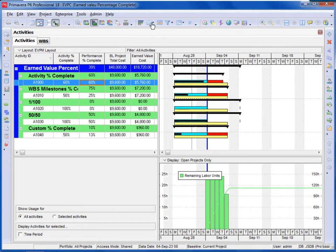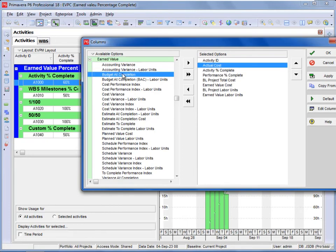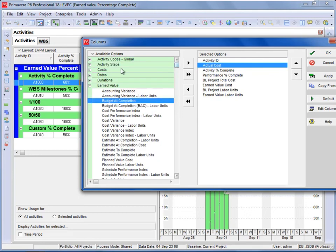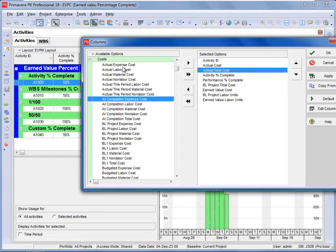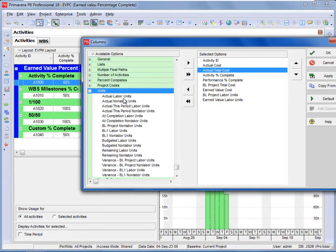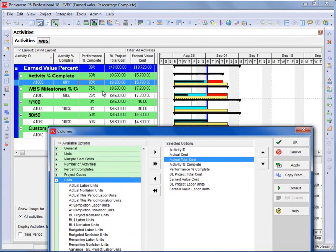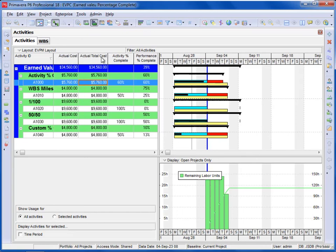If you go to the columns in the activities window and select Earned Value, you can see actual costs there. These actual costs from the Earned Value columns will be exactly the same as the actual total costs from other columns. You can see actual expense, labor, material, or non-labor costs. Going to the units, you can see only actual labor and non-labor — it will not display actual expense quantities or material cost quantities. When you select OK, the actual costs from both the Earned Value fields and the other column fields show exactly the same value.